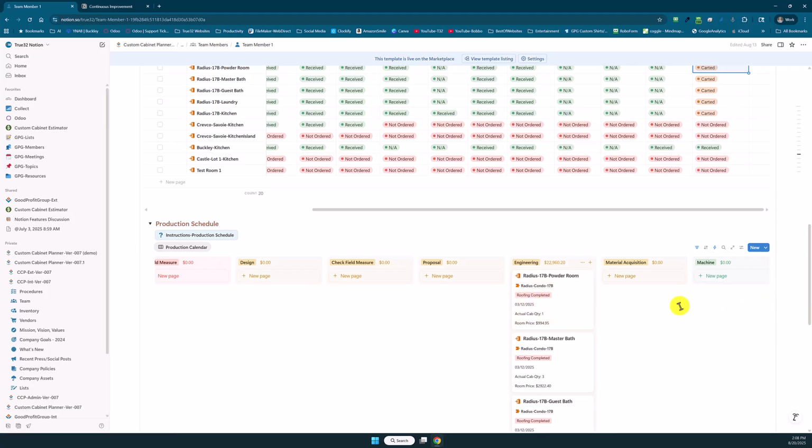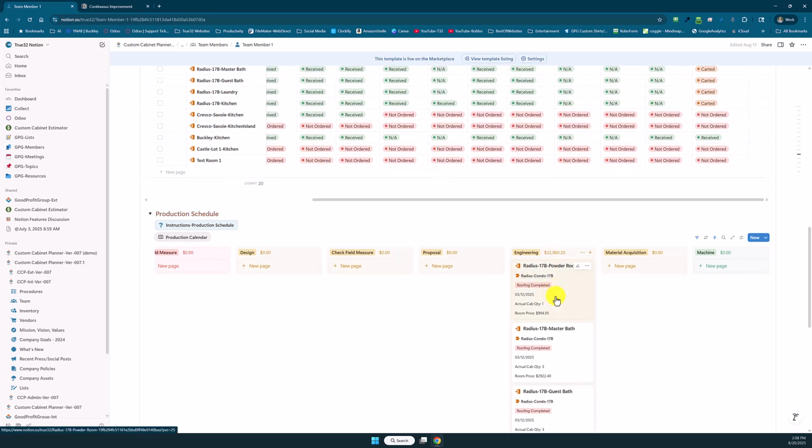So this kind of reveals our purgatories. Wherever we see large dollars here, means possibly that the thing after it is our constraint. That's one indicator, is if a whole bunch of things are always in a column, then the thing after it is probably your constraint. Or this thing stalled and we need to get it moving.